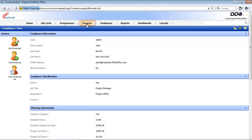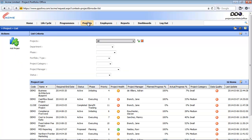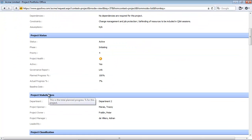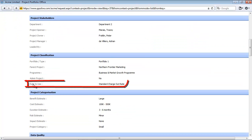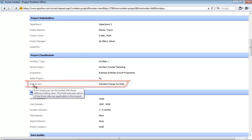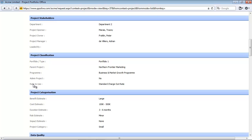The next entity that relates to resource planning is the project entity. I'm going to click on the project's menu item and from the project list, click on one of the projects. Within the project view page, you will notice a field called 'Rate to Use'. Users can define per project which charge-out rate should be used for all employees working on the project. If the standard charge-out rate is selected, PPO will use the standard charge-out rate in all resource cost calculations for each employee working on the project.